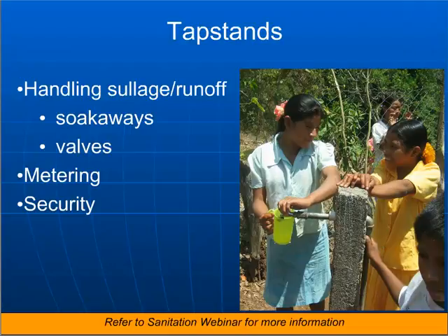So again, I think it's important to have almost a series of drawings that you can use to guide the process through different phases of construction, and not just have one drawing that's very cluttered and perhaps difficult to read if you're not already skilled at picking out details from design drawings.